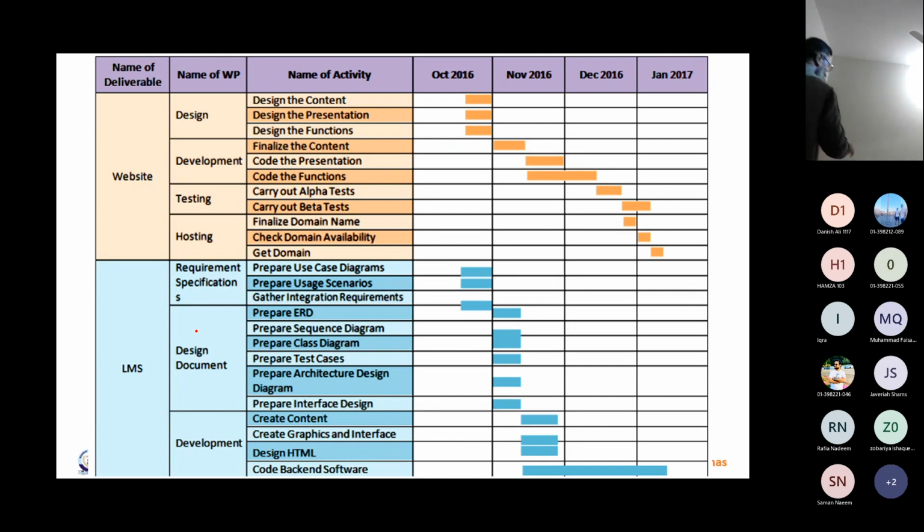Okay. So what is this now? Based on the baseline, this is the schedule. If I show the relationships here, this simple Gantt chart is called the schedule baseline. The actual schedule baseline looks like this, that you would see in the MS Project baseline, right? Okay, so this is my, let's say, Gantt chart of the schedule baseline. Is it clear? So define activities, sequence, estimate duration, and then develop the schedule. Correct? Schedule is done. Then comes the cost.